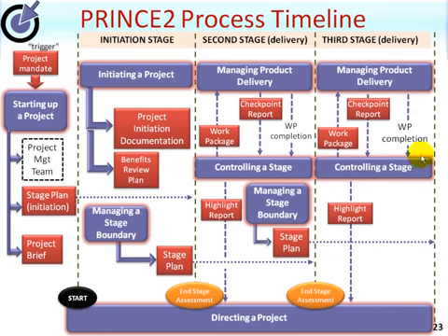However, when the final work package in the final stage is completed, then the project manager will see that the project end is approaching, and that will trigger the use of the process closing a project. Not shown in this diagram, there are management products created as part of closing a project. Once the end product has gained customer acceptance, it is passed on to them, and the project manager proceeds to close down the project in a structured manner.